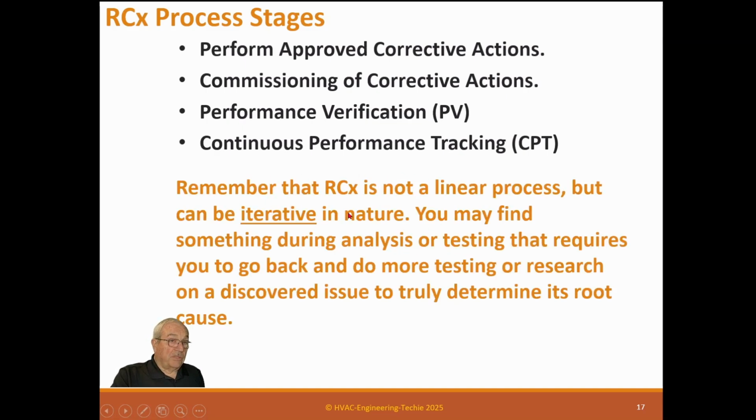Main thing to remember is that RCx is not a linear process. Now we teach it as a linear process. We don't know how else to do that. But it can be iterative in nature. You may find something during analysis or testing that requires you to go back and do more testing or research on a discovered issue to truly determine its root cause. This is really, really important. It's not that hard to do, but if you have your mindset like this, then you'll get there.